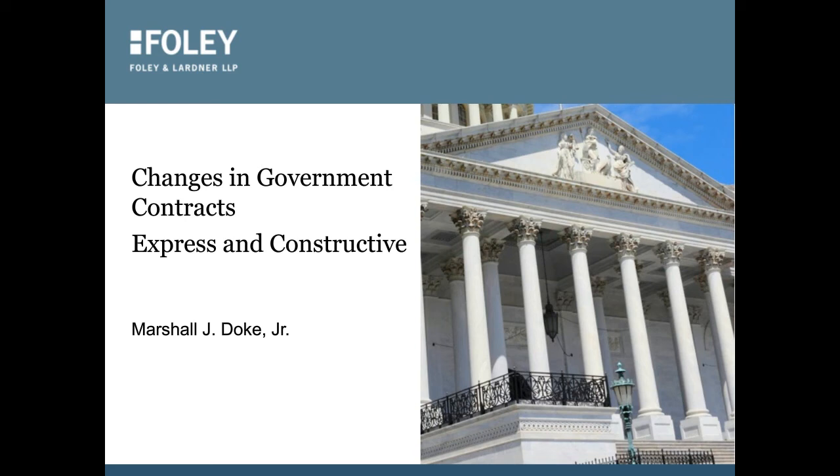Superior knowledge is another constructive change. When a contractor is not advised of information that is exclusively available to the government, and if the contractor is misled in submitting its price, that may be a breach of contract. The government is not liable if the contractor has or should have the information available to it. Inspection and testing is another area of constructive changes. The government's insistence on standards in excess of the contract requirements entitles a contractor to an equitable adjustment. Even the government's discretion to change the method of testing can be a constructive change.